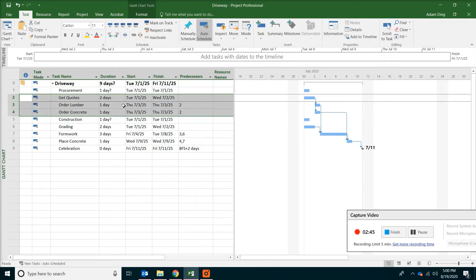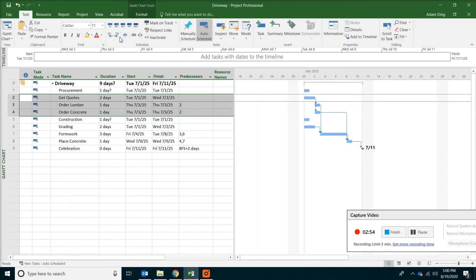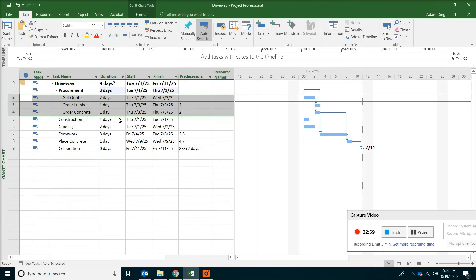And then we organize the tasks into those phases. Select get quotes. Order lumber. Order concrete. And then on the toolbar find a button. And it's called indent task.